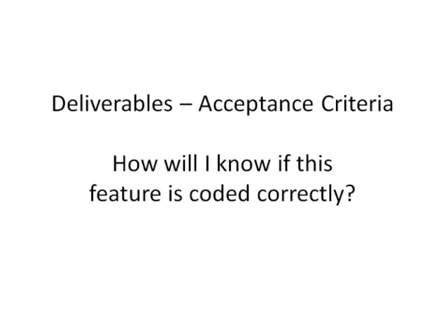More so than anything else, it's important that this is developed prior to giving an estimate on the story, because this will show all the use cases and test scenarios for that feature. The textual description of acceptance criteria defines the functionality of a story. Acceptance criteria needs to include a list of the actions that a user should be capable of performing, the intended results, behavior, and user experience. It should also include the actions that a user should not be capable of performing and those intended results. It needs to discuss exactly what happens when a user takes any action.